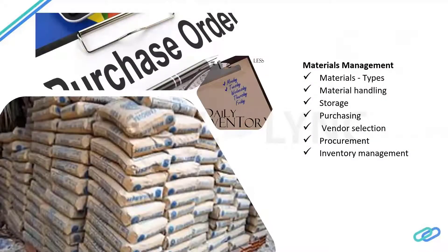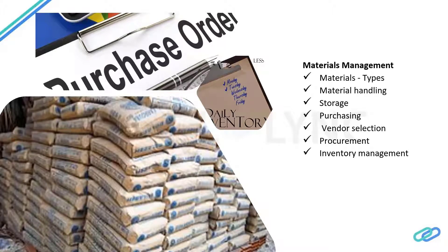Another important aspect is material management. We have to deal with different types of materials and should know how to handle them. For example, we cannot store cement bags in a wet oily place, and we cannot store glass panels vertically one above another. Glass panels should be stored horizontally in an inclined way. These are basic ideas a material manager should have while storing materials.